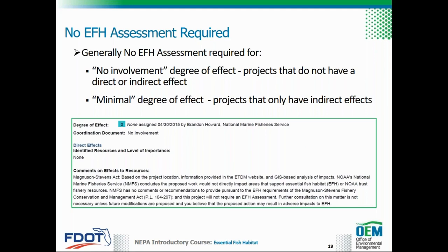Generally, no EFH assessment is required for projects that have been assigned a no involvement degree of effect by NMFS. These projects do not have a direct or indirect effect. Projects that only have indirect effect are typically assigned a minimal degree of effect. An EFH assessment is not normally required for these types of projects either.